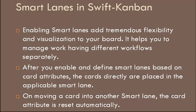After you enable and define smart lanes based on card attributes, the cards are directly placed in the applicable smart lane. On moving a card into another smart lane, the card attribute is reset automatically.